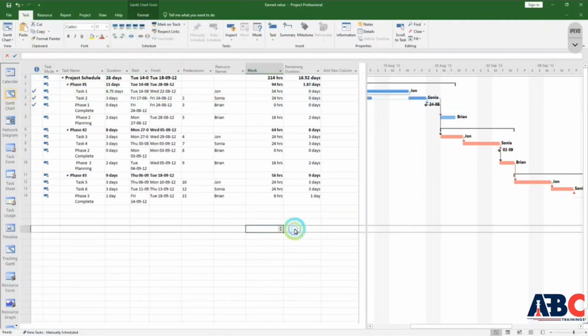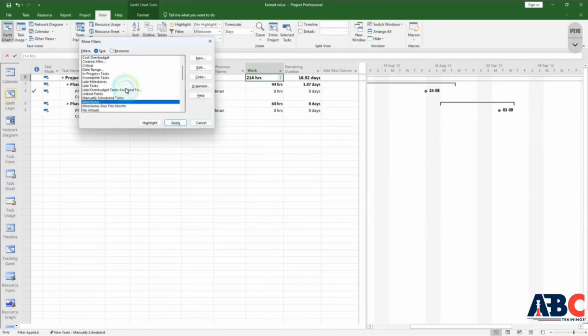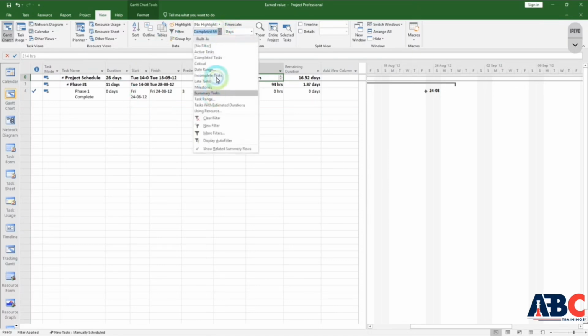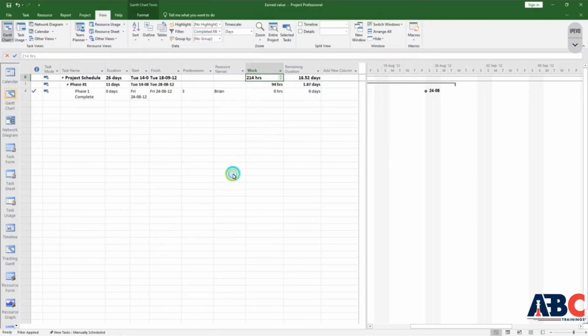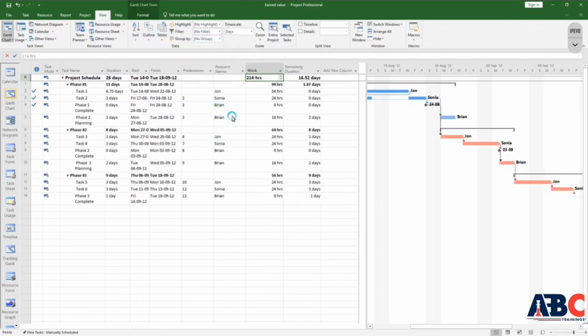So as you go to filter from here, if you want to take milestone completed, then go to More Filters. There is an option, completed milestone. After that, all your completed milestones will be shown, only those. So like this, your filters can be used. It has defaults, and here there are different types of task filters which you can use. Okay, if we want to remove this filter, simply go to filter again and click on Clear Filter. Your applied filter will be removed.